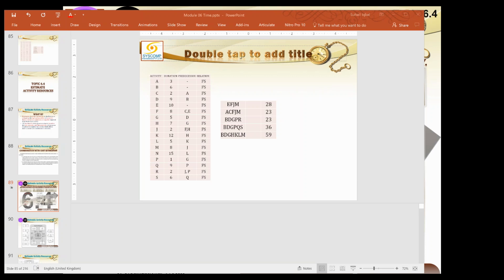I must consult the risk register and see whether my calculations of the activity resources are impacted by that. Cost estimates can restrict me by providing an upper limit of spending in a period, and I cannot employ more than those people because of the limitation of the funding. So I must consider that as well. And enterprise environmental factors and organizational process assets will be there.